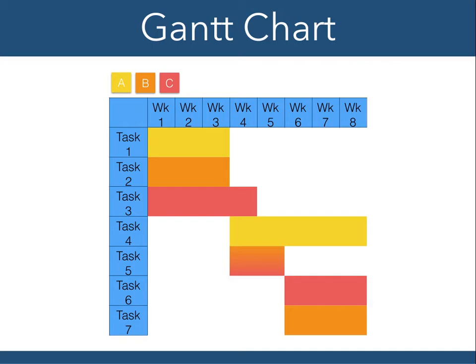But fortunately, in academic software development, it's actually much more common to see Gantt charts that look like this. So this one is, in a sense, some of the least interesting Gantt charts that there are around. And literally the only thing that stops the starting of the next task is a developer finishing the previous task. So C abuts C's work on 3, abuts C's work on 6, and similarly 1 and 4, 2, 5, and 7. So those are the nice simple ones, and that brings one in nicely to the question of how do you deal with it when things go wrong.